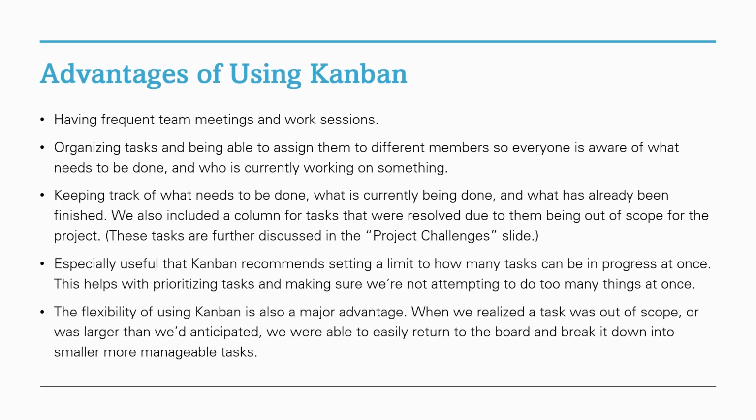The flexibility of using Kanban is also a major advantage. When we realized the task was out of scope or was larger than we had anticipated, we were able to easily return to the board and break it down into smaller and more manageable tasks.